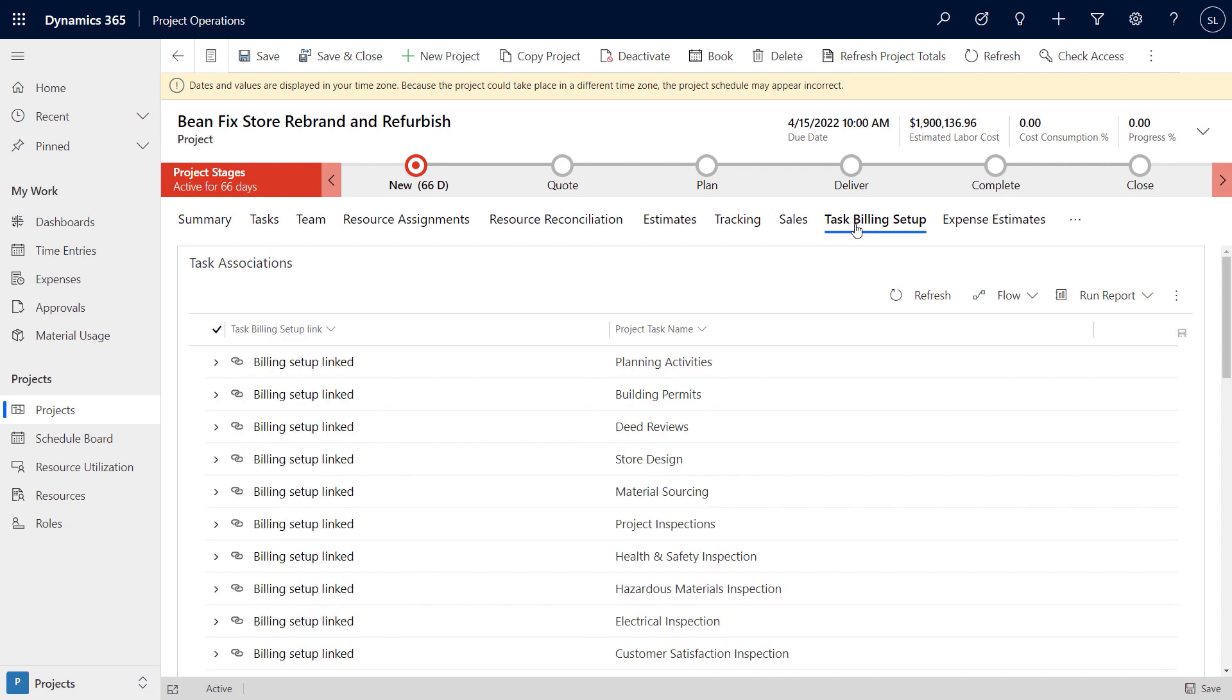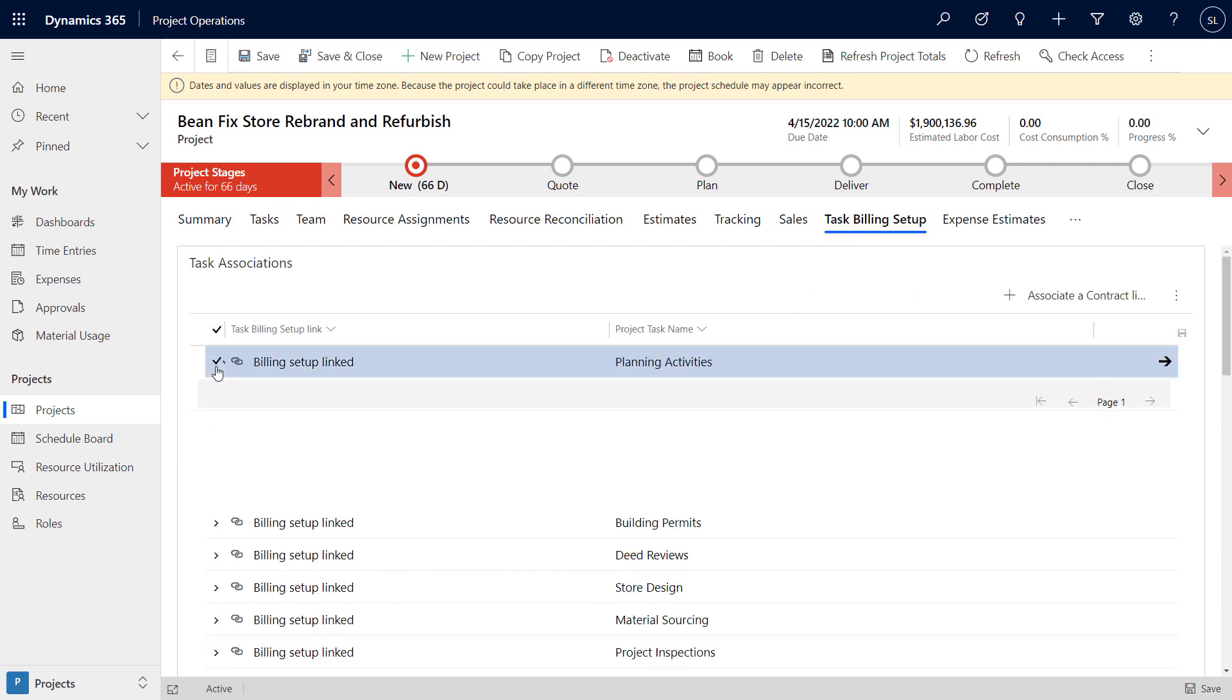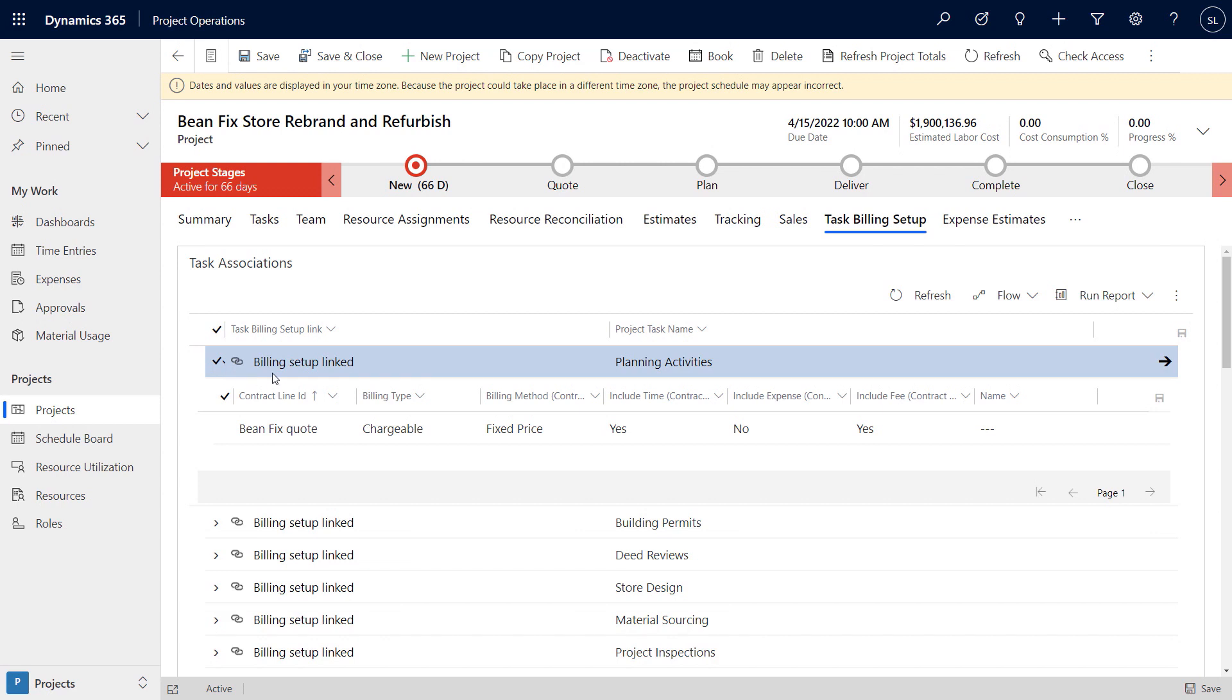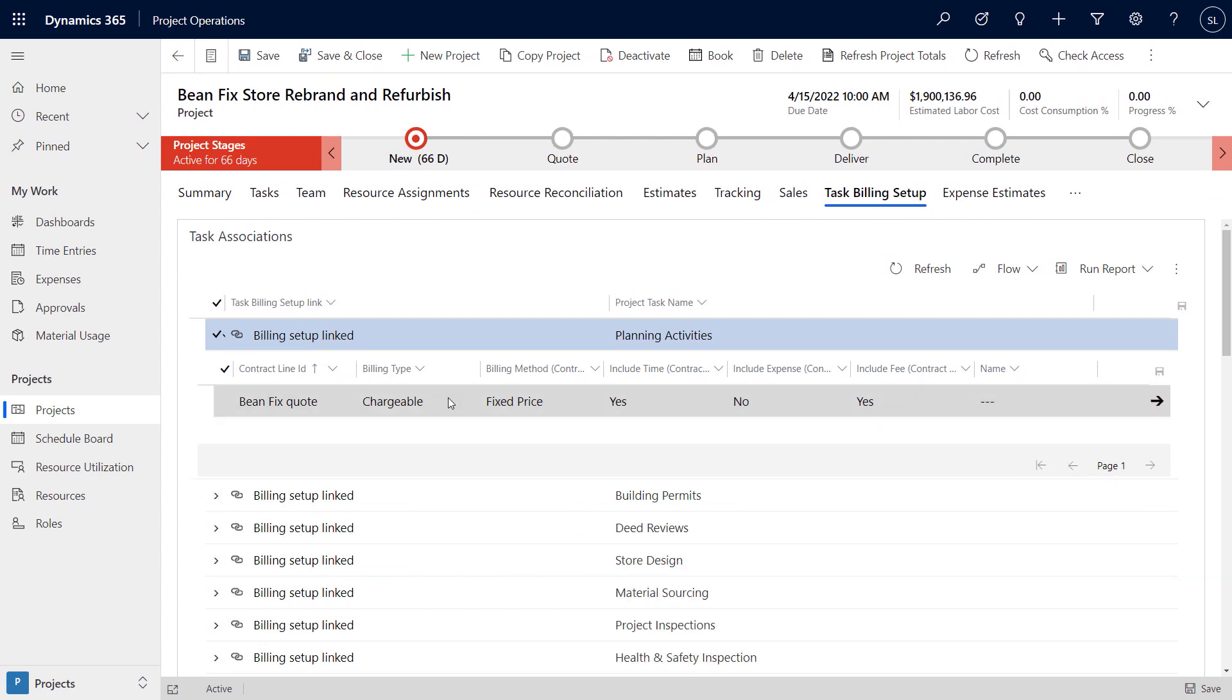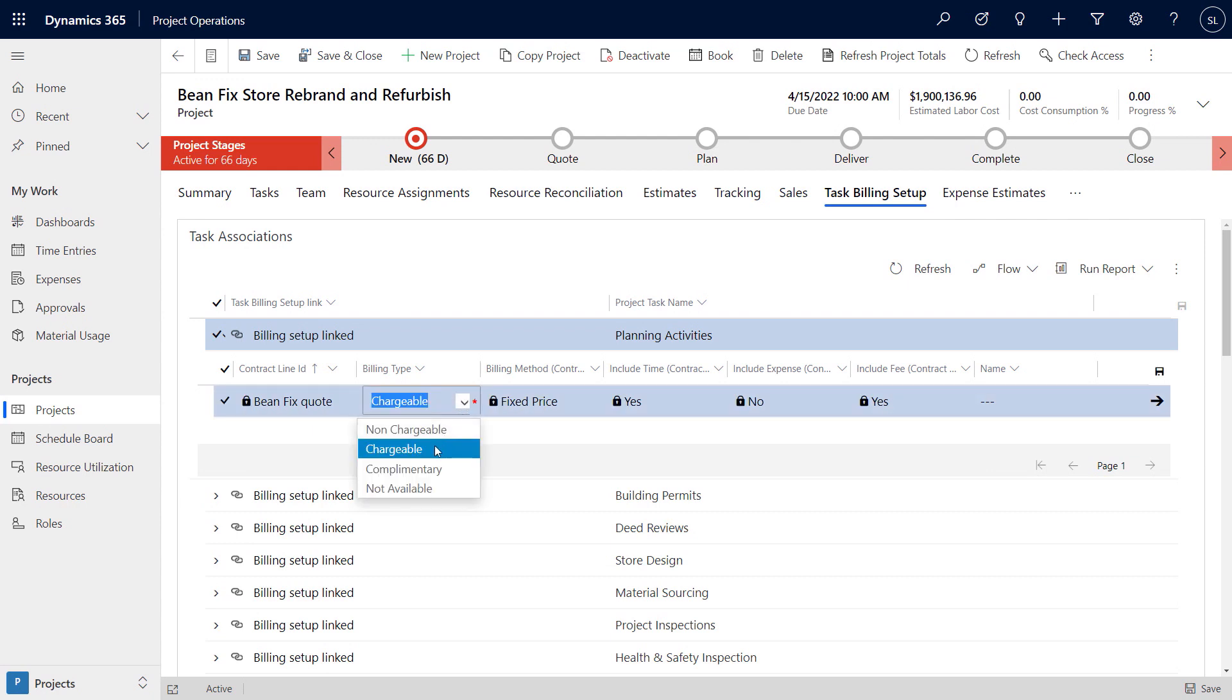We've just introduced a new feature that lets project leads define whether certain tasks should be complimentary or not chargeable to the customer, like proof of concept or pre-sales activities, while remaining tasks may require fixed fee or time and materials billing. For this project, we can change just the planning activities to be complimentary.